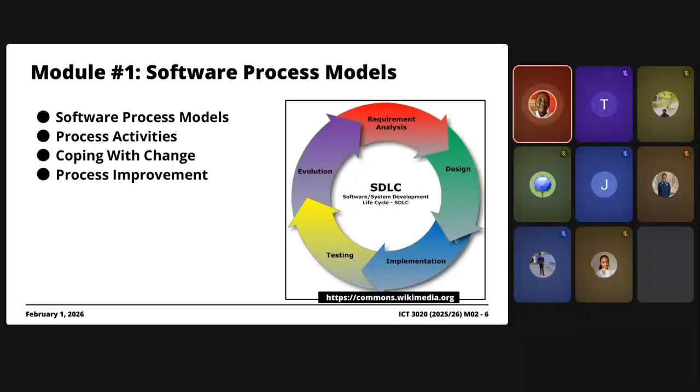You modify the design, you rewrite the code, and you retest. When you're spending more time, that's more money. And because it's more money, the initial amount agreed upon may not be sufficient. So there are negotiations that will take place, and maybe the client will agree to pay you extra money for that. You understand this?